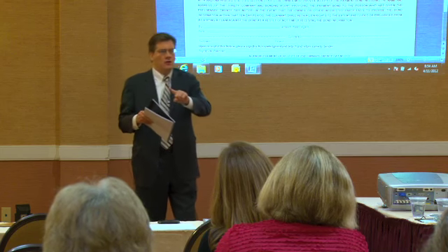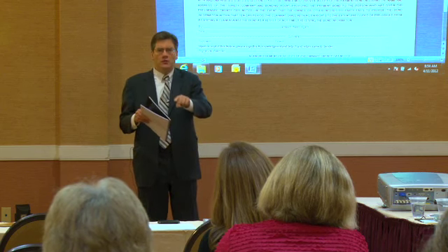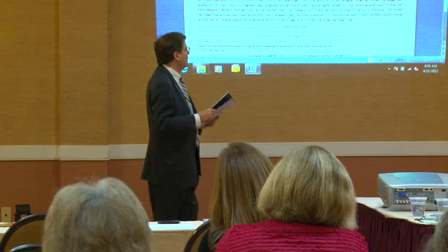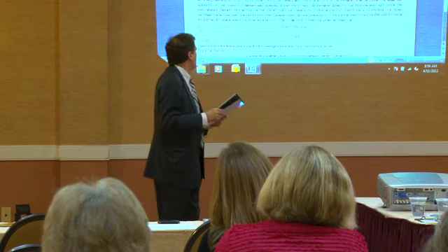Now, you can't get it wrong on the lien claim. You've got to get it right then. The lien claim's got to be bulletproof. But the preliminary notice does not have to be bulletproof if everyone who was supposed to get it got it and they don't correct misinformation.